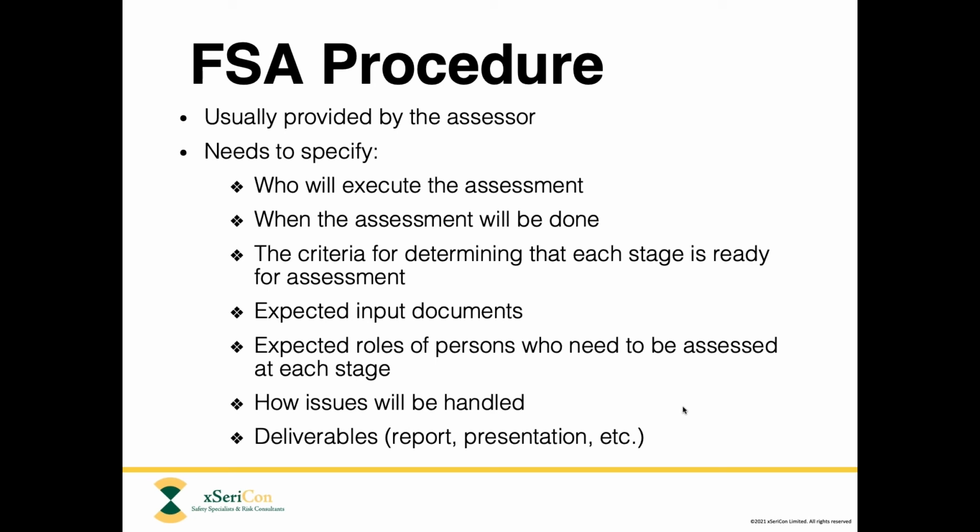We also need to give some kind of indication of when, as in what stage of the life cycle, the assessment will be done. The reason for that is we have to make sure that the team knows what preparations need to be done, and at what point we can trigger the assessment. One quite common problem that we see is people asking for the assessment too early, when the design is not mature enough and the documents are not really ready. That can be quite difficult because then we end up raising a huge number of issues relating to missing evidence, which then all have to be laboriously closed out one by one. Whereas if we had just waited a few more weeks until the documents were actually ready, then all of those issues would not arise.